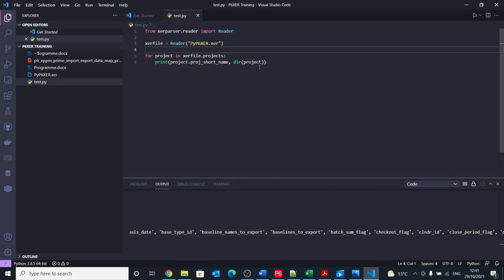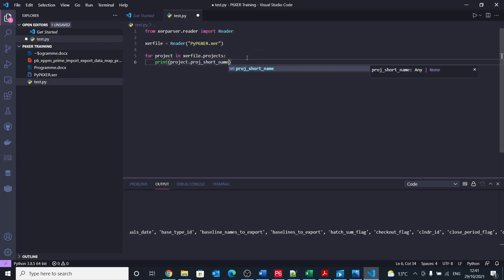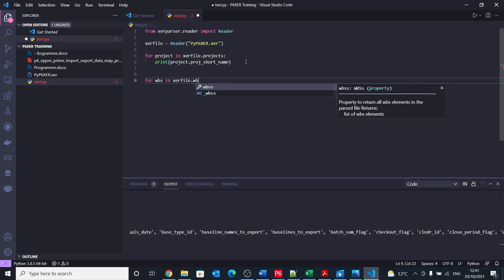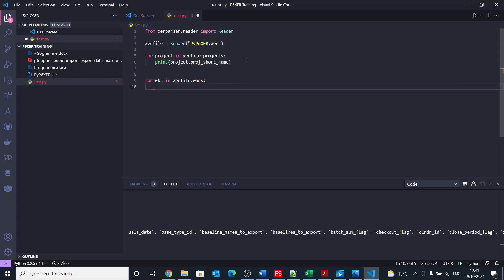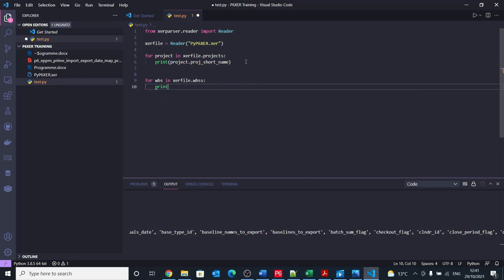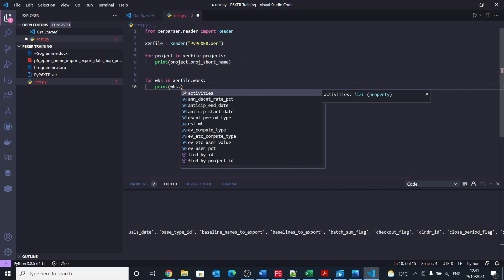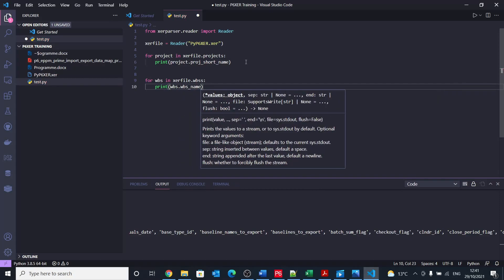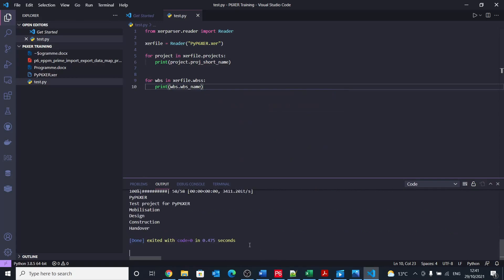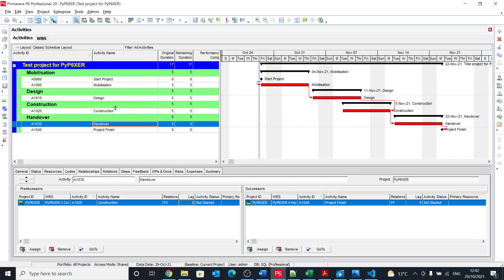So let's now as we got this, move into WBS. So this will be the project. Let's go for another loop. So for WBS in xcr file dot WBSs, and I know the naming might not be the best, but that's what I came up with. So after that, we need to print and we say WBS dot, I think it's WBS name that we need. And when we run this, we got the project name, which is printed from this line of code. And then we got test project for xcr, which is the name of the top level WBS: mobilization, design, construction, and handover. And these are exactly what we have in here.